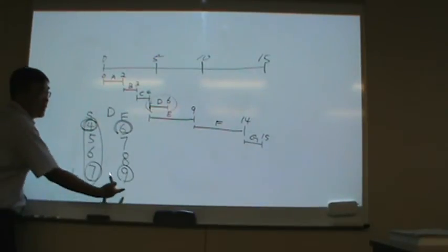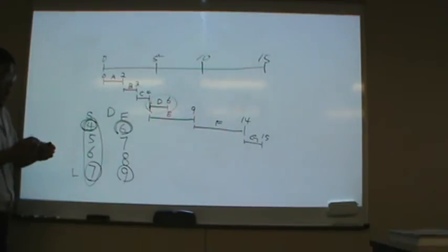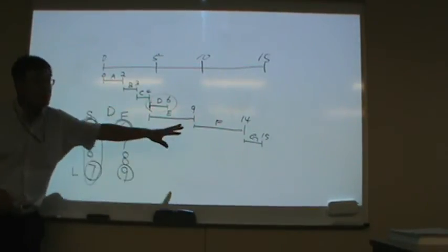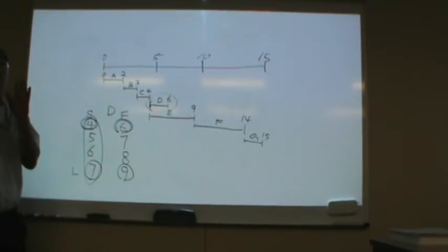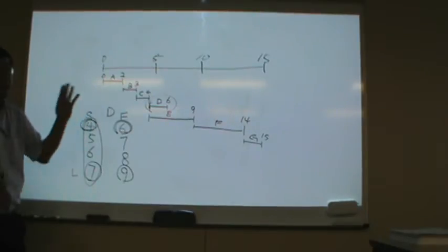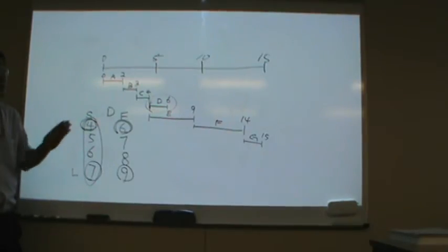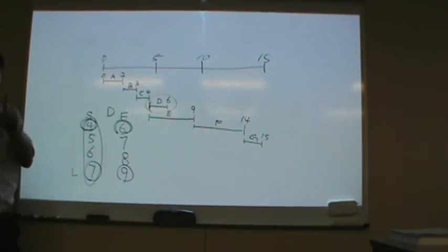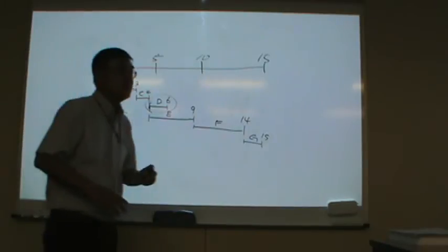Late start, late finish. For the others, there is no allowance, right? It's tight, so if this one is delayed, then the entire project is delayed. This one delayed, and so on, right? Only activity D has some allowance or spare time, right? Flexibility, yes.